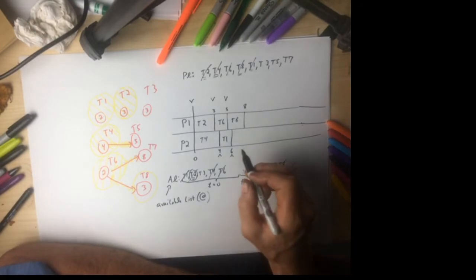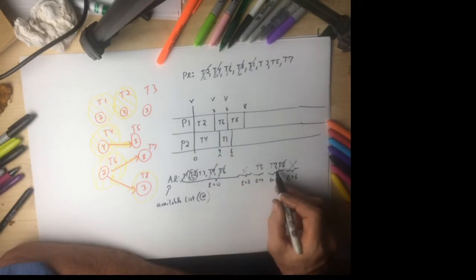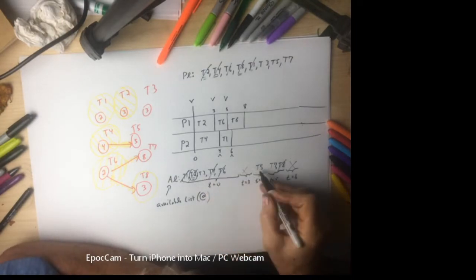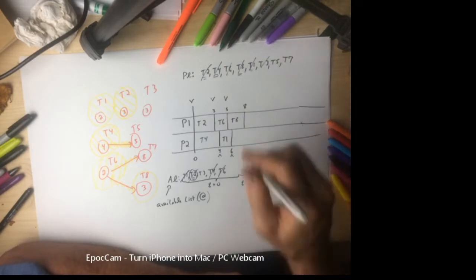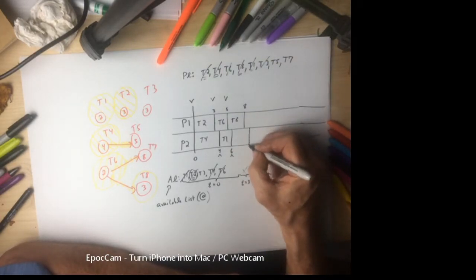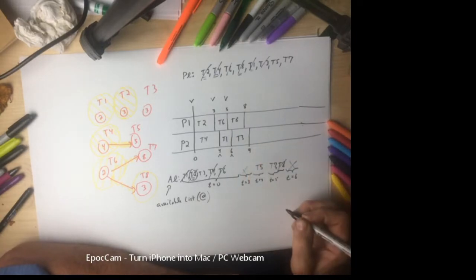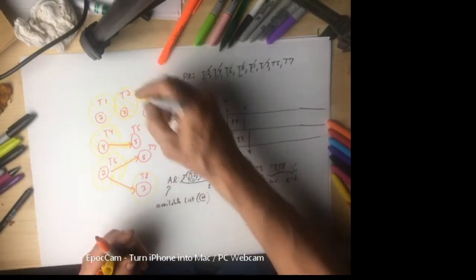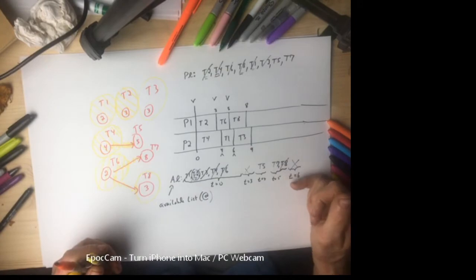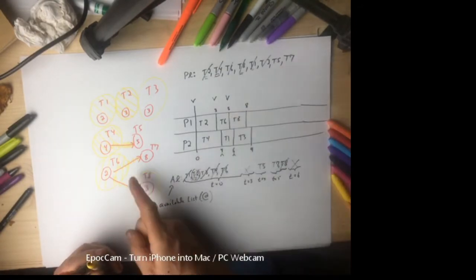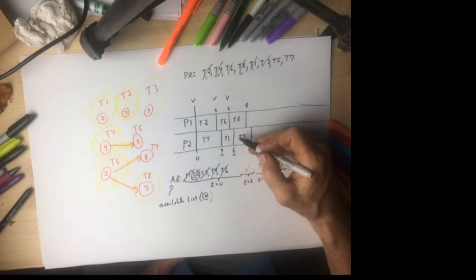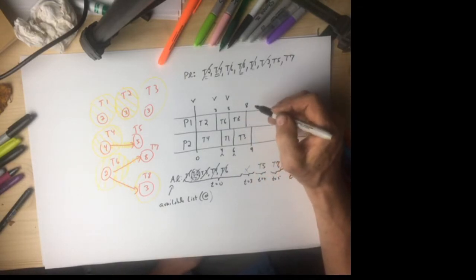Well, 1 person waiting, 3 jobs, priority list tells us what to do. And the list says between 3, 5, and 7, we pick 3. So we're going to drop in T3 here, which is going to run for 3 hours, which will finish at 9. Cross that out because it's assigned. Go over here and circle it because it's assigned. Available list updated, priority list updated, digraph updated, end of times all put in there right. Time for the boss to take a nap. Now this time the boss gets to take a little bit longer nap, from 6 to 8 o'clock. Again, he gets to sleep until someone wakes him up.